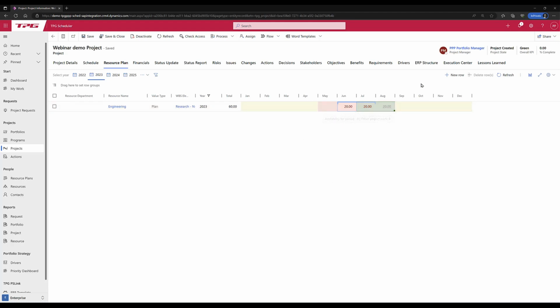You'll notice there's a heat map. There's a red, amber, green shading going on here. This is a neat feature within PPP where we get a live heat map on resources as we build them into our projects to inform us that a resource is allocated elsewhere, and it helps us potentially assign different resources or start the discussion around our other resources available. So very quickly and very easily, I've put together a financial forecast and a resource forecast. I'm now ready to send this off to SAP.